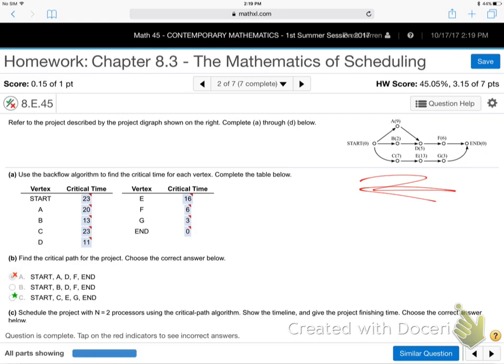If you have just a simple job, 1 hour, but behind it is a bunch of 20-hour jobs, you better get on that 1 hour job as a priority so you can get to the big jobs behind them. You know what I mean? So it's not just how many hours is the job right in front of your eyes. It's how many hours all the way to the job end that job leads through. It's the path. That's what they call critical path. So it's not just about doing the biggest job, it's about doing the biggest path first. That's really efficient management.